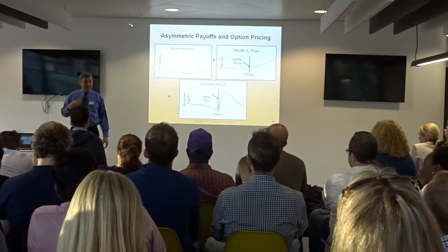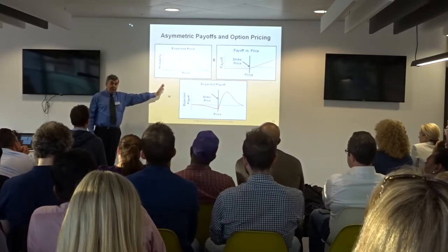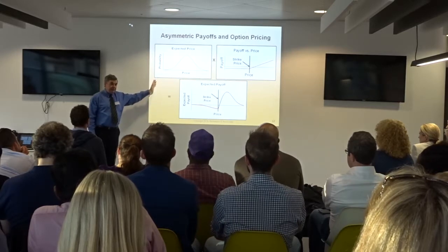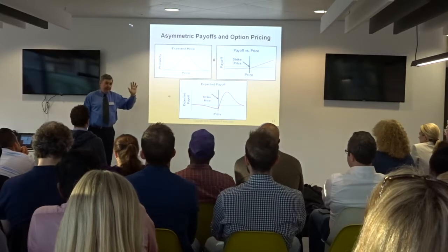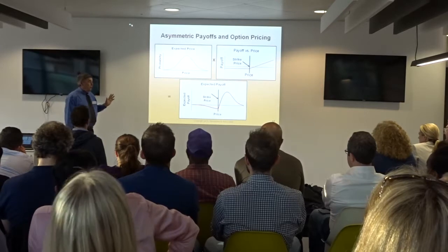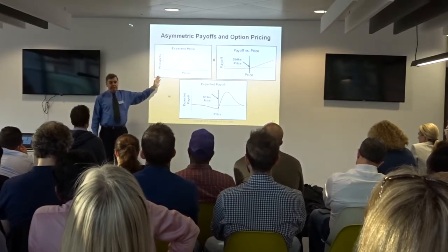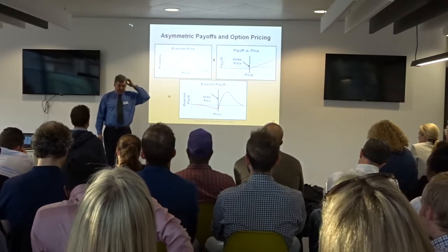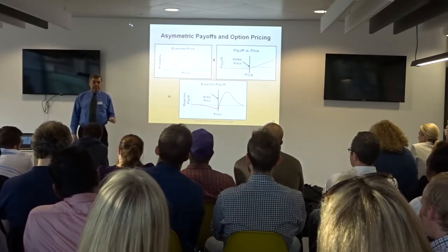The real answer is it's when variability runs into an asymmetric payoff that you get money from variability. Variability intrinsically does not make you money. It's variability processed through an asymmetric payoff. And the implication of that is that what you want to do to your process design is increase the asymmetry in the payoff functions. And just to give you a simple example, that is precisely what is being done.